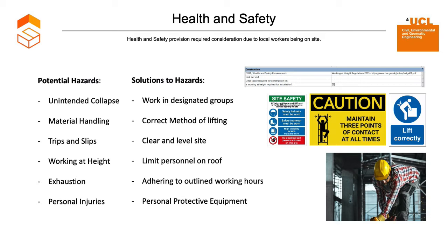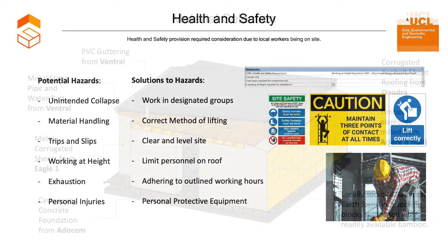Coupling the designated training at the beginning of the project with appropriate signage around the site, these risks have tried to be limited as much as possible. The proposed solutions and methods to minimize the risks occurring are seen and will be taught during the health and safety training at the beginning of the project. Moreover, the Revit model has specific information attached to certain elements that require extra attention. For example, the roof panels, in which working at height may require harnessing or prior experience.